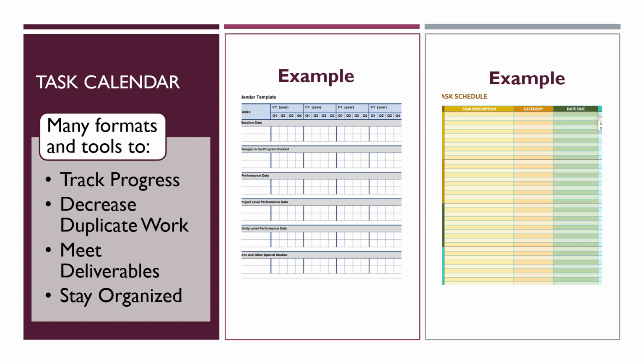If your proposal included a summary of tasks and/or a project timeline, this will be the basis for the creation of a task calendar. In general, your calendar should include internal task timelines such as hiring new staff or hosting a series of community events, and any recurring dates associated with the grant process, such as report deliverables, advisory committee meetings, and annual objectives. To be a useful tool, and not just busy work, try to use a system that includes communication functionality within the system to connect the tasks and goals to your project. This will be helpful when you start to prepare progress reports.